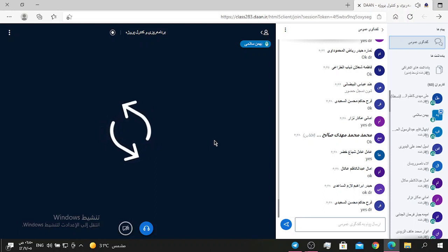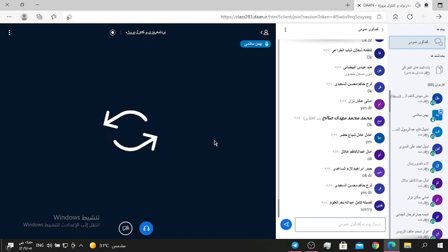External dependency. External dependency involves a relationship between project activities and non-project activities. These dependencies are usually outside of the project team's control.